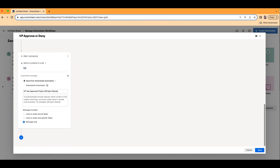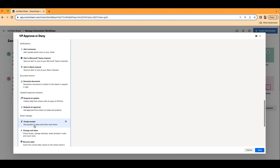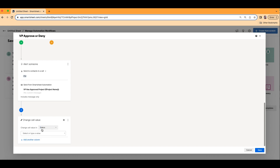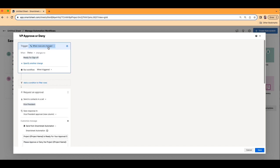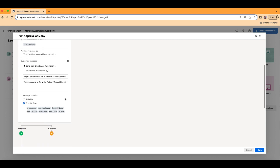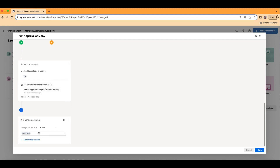Maybe we just want to give them the message only — they don't need the entire information. We'll add another automation, add action. Maybe we want to change the cell value so that when it's approved, the status is automatically changed to Complete. So what's happening here is: when the row changes and the criteria is when Status changes to Ready for Sign Off, whoever is in the Vice President row will get an automation to approve or deny. If they approve it, the PM gets alerted and the status will automatically change to Complete. It's all automated.